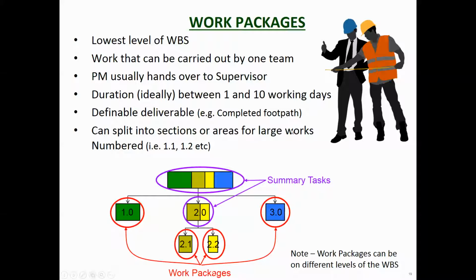So if you've got a 1.5 kilometre long road, you don't have to say 1.5 kilometres of curb and channel. You can say curb and channel from chainage 0 to 500, from chainage 500 to 1000, from chainage 1000 to 1500. So you can split that component into sections if needs be. There's no hard and fast way of doing this. It's really what works for you.